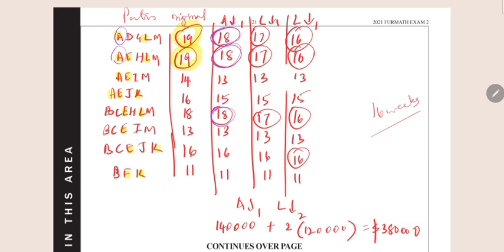And then I looked at it again and I thought, what is the other path that can be reduced? L seems common between this one and these two. I didn't choose A because A is not common with the third path, okay? And I started to reduce L. I got 17, 17, and 17 along those three paths, which was the largest value. Now I know I have to bring it down to 16. So I said, okay, we can reduce an activity by 2 weeks. And L was the only common activity. And when I reduced it, I got 16.